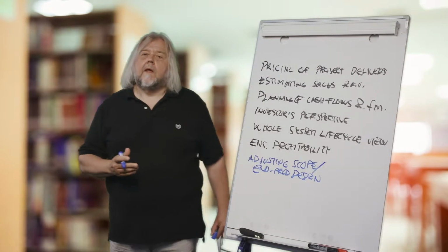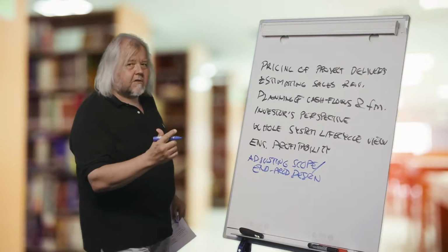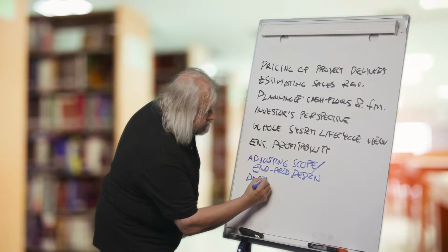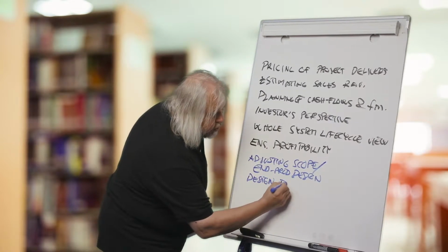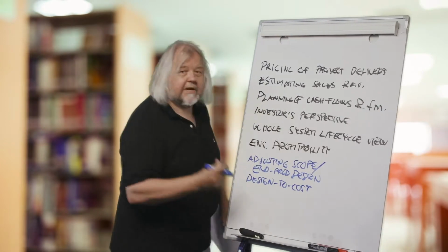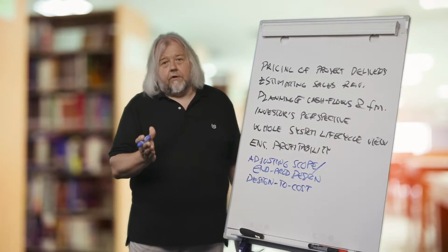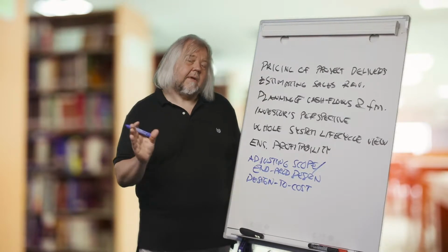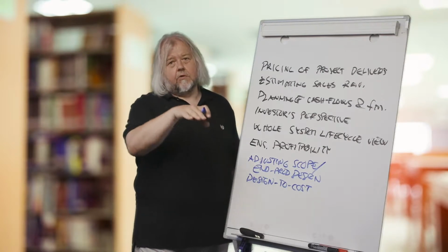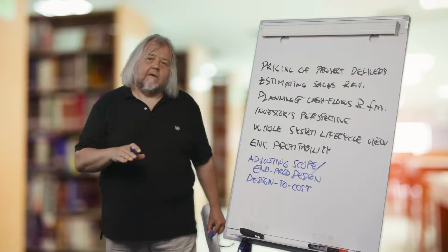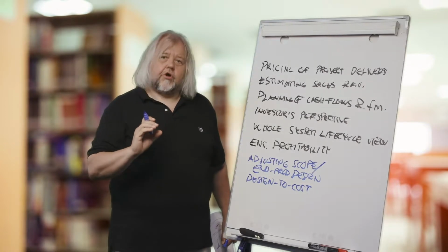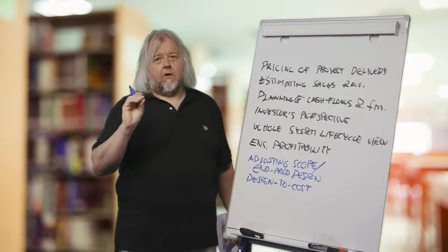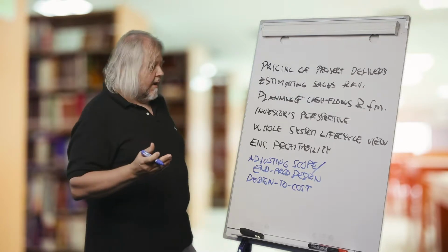And we can do this, for example, by adopting a design to cost principle by requiring that the project personnel who are designing the project and implementing it try to aim to a certain cost level. And in this way, we would control the quality so that there is the right kind of quality of the project and not over quality.